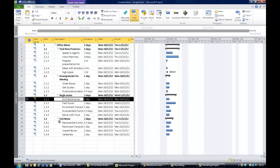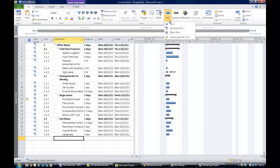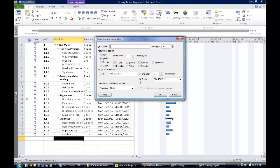The next point is to enter a recurring task for a weekly meeting: one hour duration, repeated for five weeks on a Monday, then move these meetings to the top of the task list. On the Task tab, click the down arrow and choose Recurring Task to open the recurring task dialog box. The task name is going to be Team Meeting and the duration is one hour.